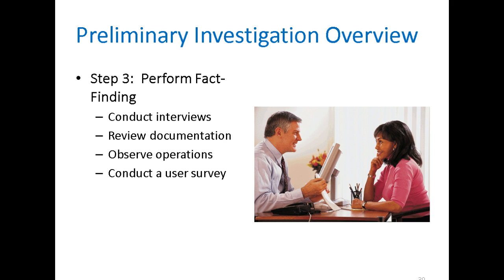First of all, when you ask a question, you're not making a promise. You're saying, hey, we're gathering information about features. Be very careful you're not promising features that then get people misunderstanding about what the scope of your project is.